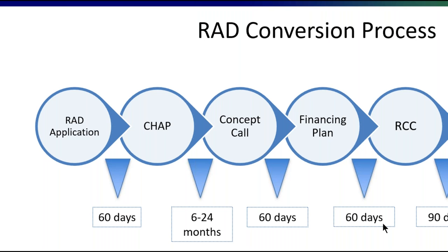And when they've put that all together, before they submit their financing plan, we now require, just like FHA does, that they first have a concept call with HUD, where we run through a checklist to see, are they sufficiently advanced and ready to actually submit a quality financing plan. Concept call is a new feature that was rolled out in the fall when we published revision 4 of the notice. And we've seen much higher quality financing plans now as a result.